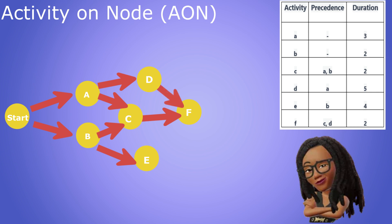There are no more activities so we can go ahead and connect F to a project end node. E does not have any activities after it. So we can go ahead and connect it to the end node as well.